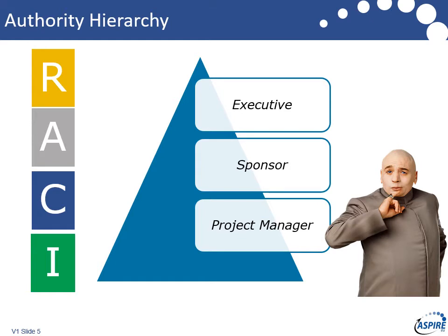So if I were to consult you on something and you gave me your views and then I ignored them, that would be perfectly okay, but actually it probably wouldn't make you very happy. So we need to always be very careful about consulted. It's the sort of thing that gets associated with stakeholders, but it's also a really major bear trap that you can fall into, because you end up consulting everybody. And so people without authority start chipping in, and then what do you do with their views?